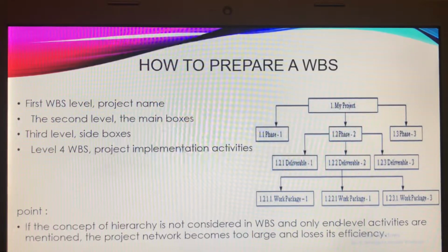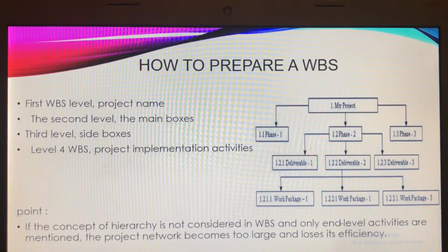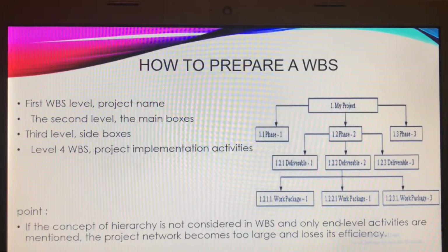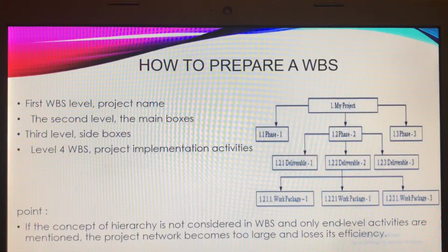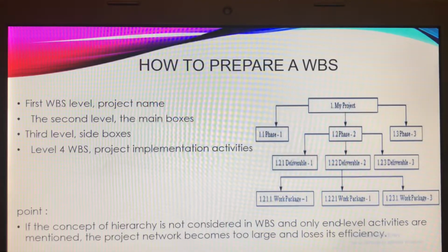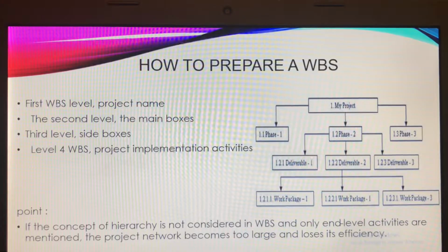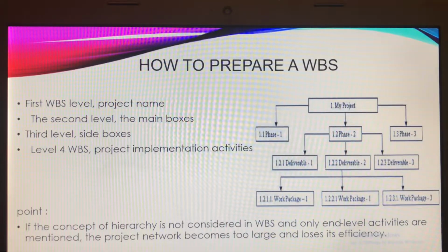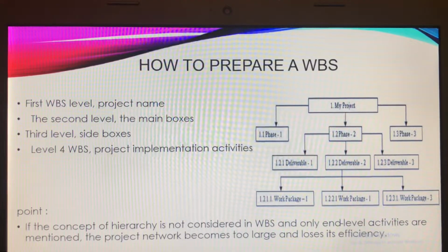The first level of the WBS is the mother box in which the project name is placed. In the second level, the main boxes of the project are located. Then the sub boxes of each main box are defined. The last level of work breakdown structure is related to project implementation activities.